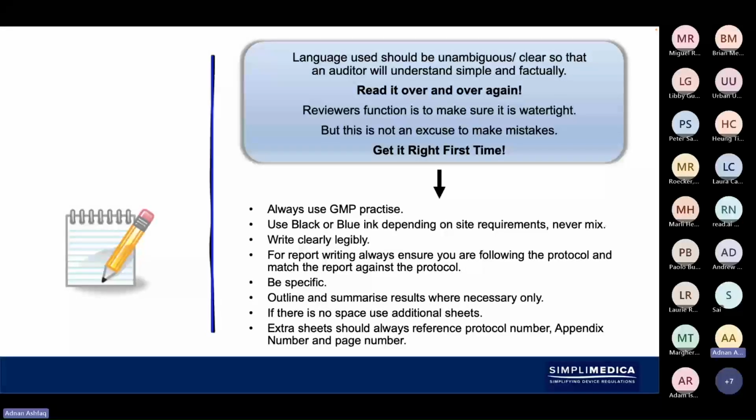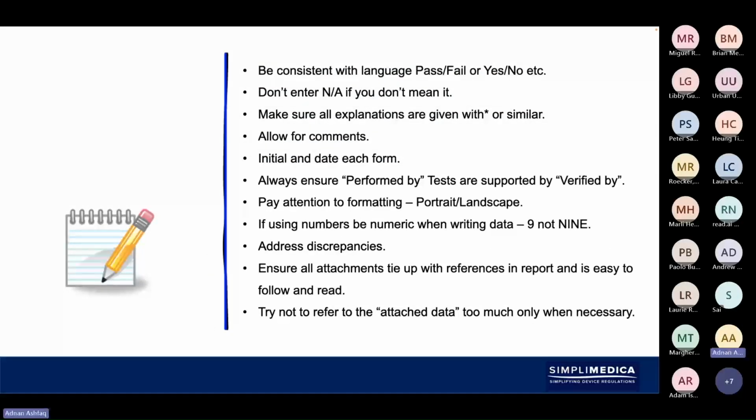There's lots of automated practices now, even within validation. I'm a bit old school, so I still tend to use a lot of the old manual processes and this way of doing things. But like I said, if you've got automated software which is doing validation, guess what? That also needs to be validated. So no surprises with that one. If you introduce any system into the process which has a level of automation, that also needs to be validated.